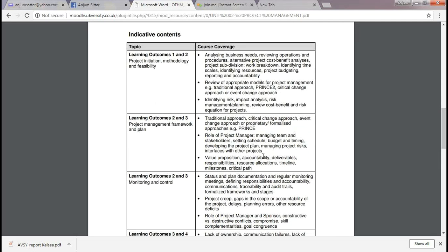So if we're not staying in a budget, we need to identify the reason why we're not in a budget. If we are not staying in a budget, we have a variance. Variance is the difference between the budgeted figure and the actual figure. So that's really crucial. We need to regularly monitor why these variances occur, due to the inflation, due to the poor estimation.